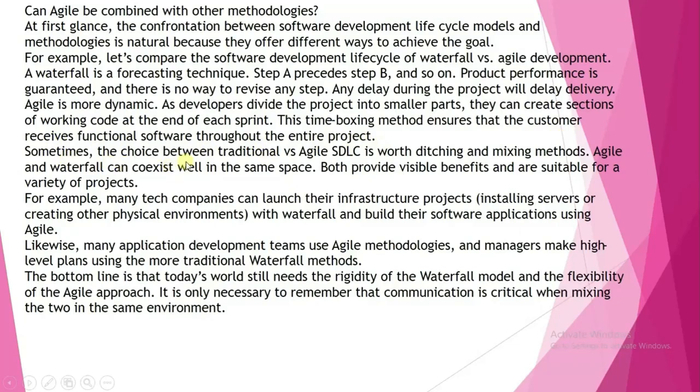Sometimes the choice between traditional versus agile SDLC is not worth it, and mixing methods is better. Agile and waterfall can coexist well in the same space. Both provide visible benefits and are suitable for a variety of projects. For example, many tech companies launch their infrastructure projects, that is installing servers or creating other physical environments, with waterfall, and build their software applications using Agile. So we can combine both methods but in separate segments.